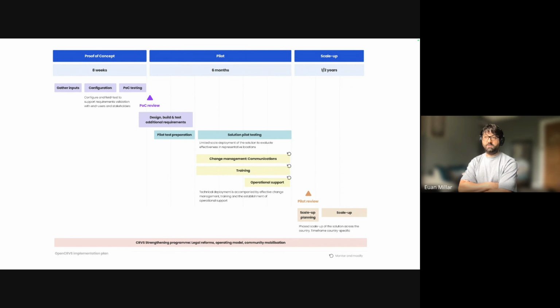Naturally, this change management process takes time. So what we advise is that a country might start a pilot implementation in 2 or 3 districts, train those staff, and start registering in OpenCRVS for real in these districts for some time, until those staff are comfortable using it and have the capacity to train other districts.